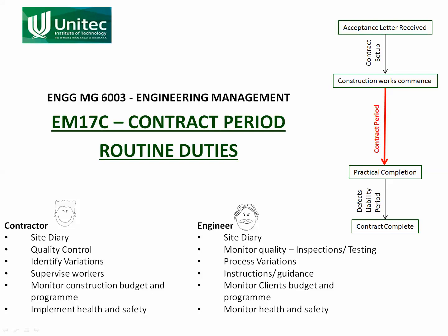In this slide cast, we're going to look at the contract period, in particular the routine duties that happen in the contract period. By routine duties, I mean the stuff that happens day to day. In the following slide cast, we're going to look at the monthly duties, because at the end of every month there's a process where you review progress, you pay the contractor a progress payment, and you all meet and discuss how everything's going. But in this one, we're just talking about the routine day-to-day duties.